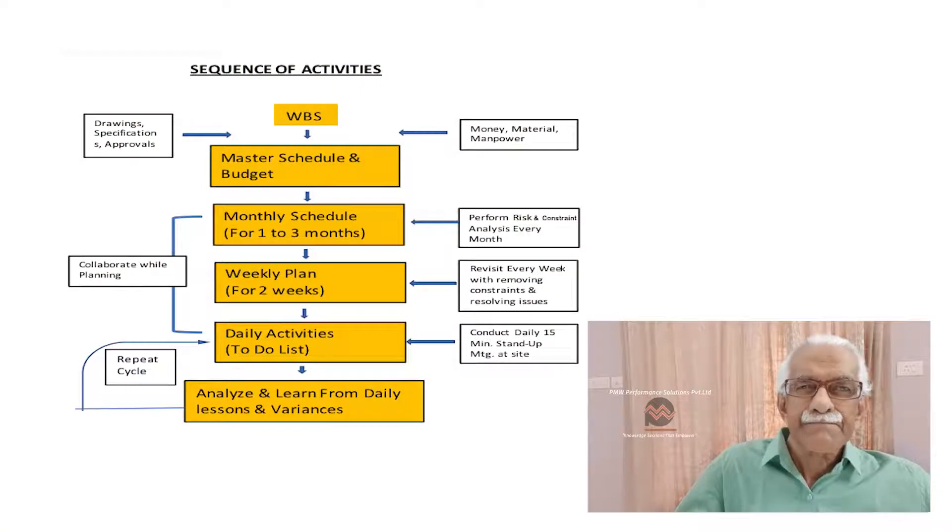The first step is to create a proper work breakdown structure. One of the prime rules in this work breakdown structure is that every level should have 100% scope on the level above it. I'm just mentioning only this one important rule.